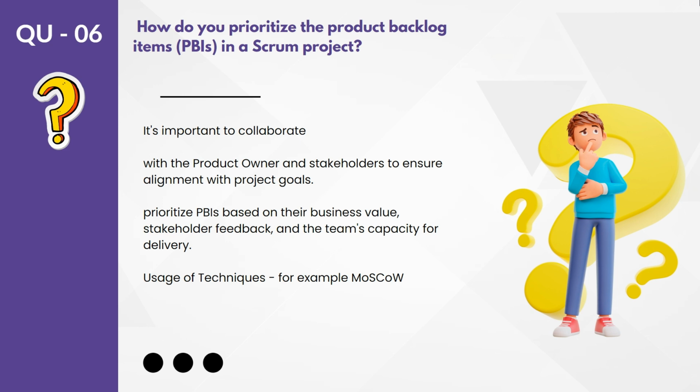Why is it important? For example, suppose the sprint velocity is 25 for the past few sprints. It means in one sprint you are delivering 25 story points. Now in this sprint, which is going to start from, say, next Monday, as per your past experience you would say you can deliver 25 story points.